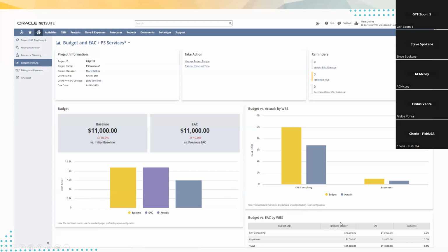And then, as you're tracking that and seeing things come along, that's where you go back to the EAC and adjust it if you see some big changes. Okay, we know we're going to need to double our budget, or maybe we're way ahead and we're looking good, so we can decrease our estimate at completion. So it's just a way to leverage all of those together.